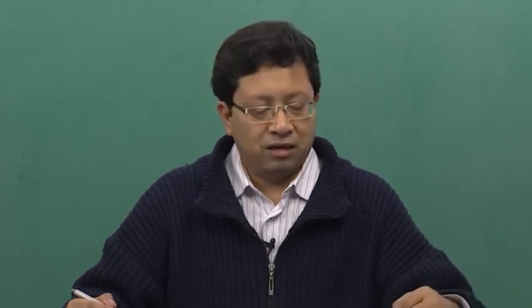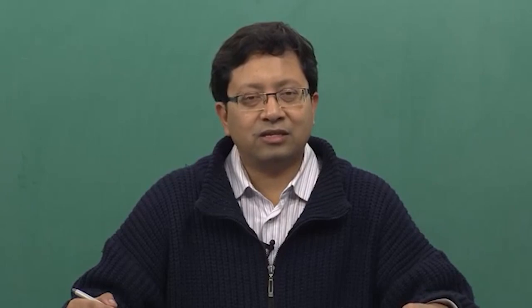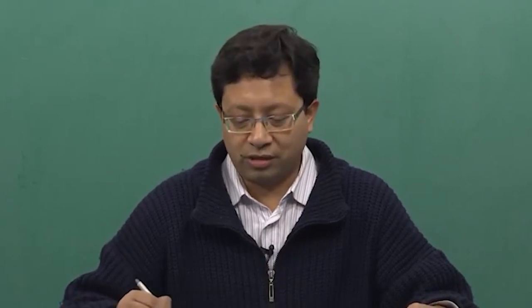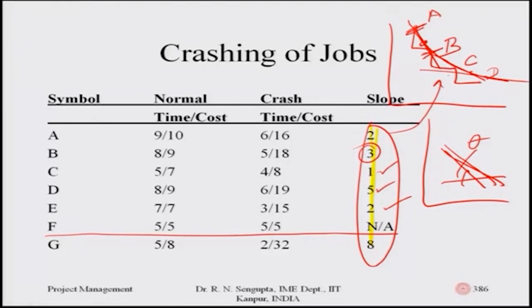For activity A with a non-linear cost, each one-day reduction increases cost by a different amount. It will be minimum for reduction from D to C, increase further as it is crashed from C to B, and reach its maximum value when crashed from B to A. The corresponding values can be found if data is given, and the same logic applies for activities B, C, D, and all others.